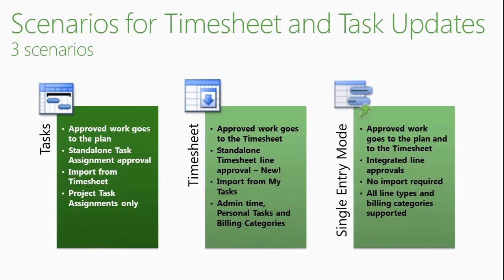So it may be approved and reviewed by someone that has nothing to do with the project management. And you have an ability to track also time against non-project activities like admin, personal task, whatever. And the single entry mode is the one that combines both. So this is new for 2010, and this is a setting that allows you to have all the information entered on one screen only, with two parts, but one screen.